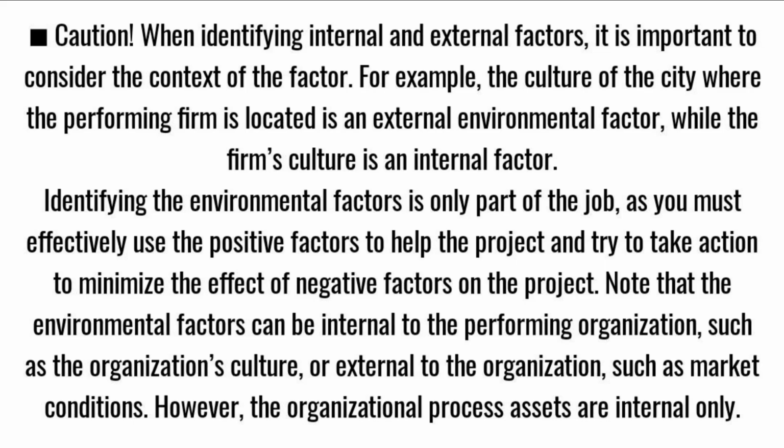Caution. When identifying internal and external factors, it is important to consider the context of the factor. For example, the culture of the city where the performing firm is located is an external environmental factor, while the firm's culture is an internal factor. Identifying the environmental factors is only part of the job, as you must effectively use the positive factors to help the project and try to take action to minimize the effect of negative factors on the project. Note that the environmental factors can be internal to the performing organization, such as the organization's culture, or external to the organization, such as market conditions. However, the organizational process assets are internal only.